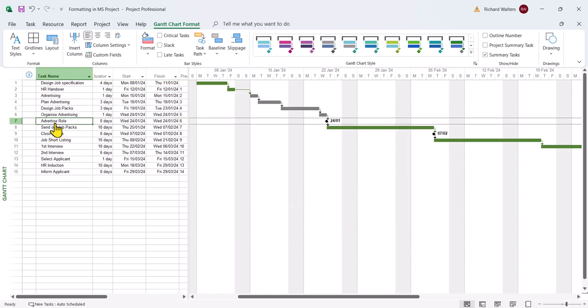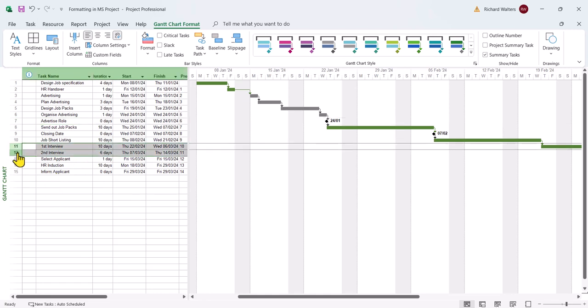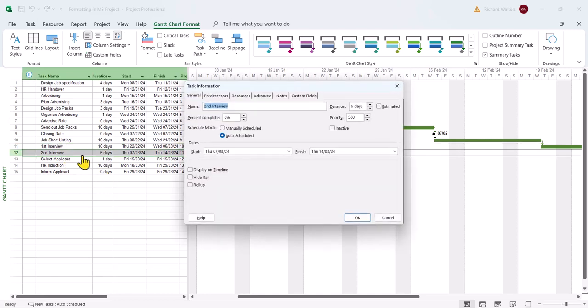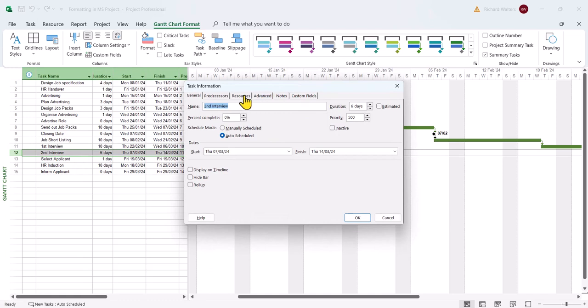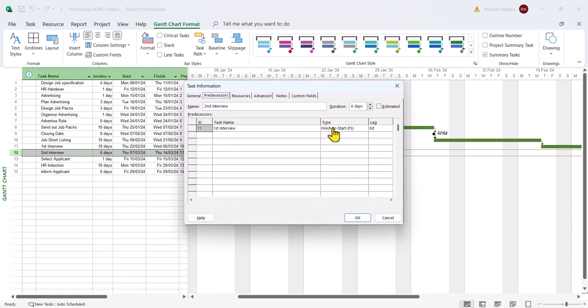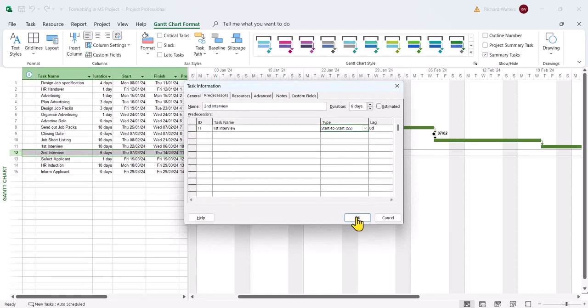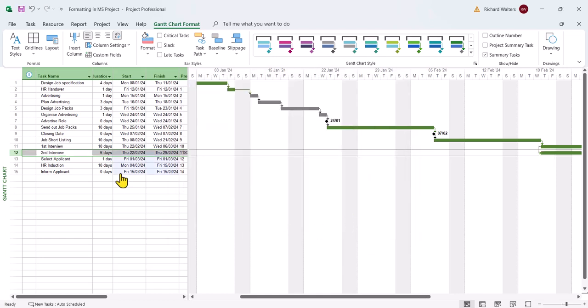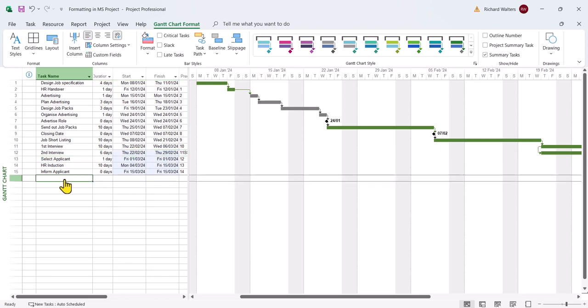There's lots of other formatting options. I'll have a look at what's called the changed cells now. When you make a change to Project, in our example I changed the link of first and second interviews presently from finish to start, I'll change it to start to start. The changed cells appear in a light blue shading. This now shows you the impact of the change you've made.